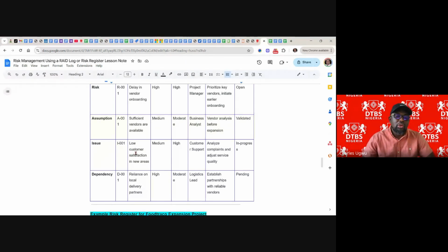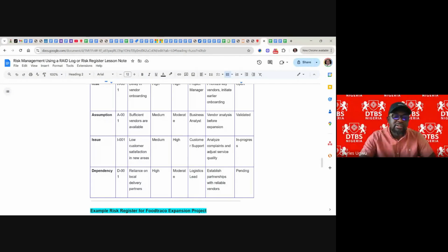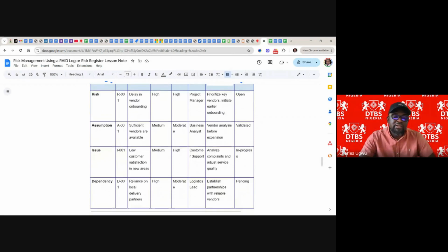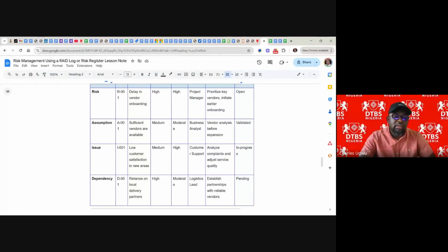And description: low customer satisfaction in new area. Customers are not happy in new area. And the likelihood of it happening is medium. If it's happened, the impact is going to be high. And the owner, we give customer support.